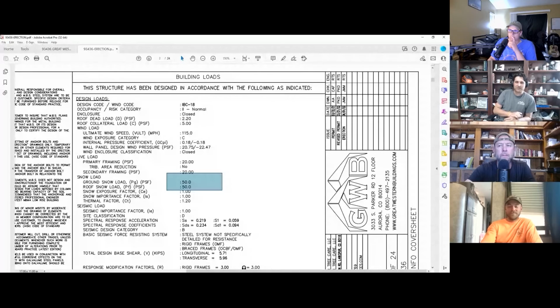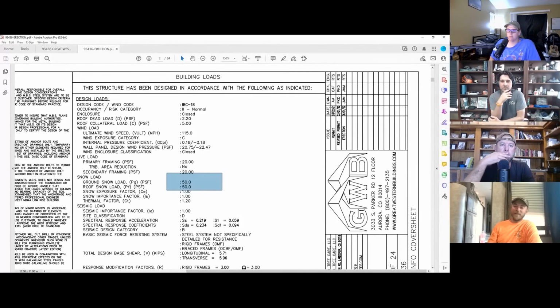And $10 a square foot or $12 a square foot, something like that for the erection. And then we had the foundation concrete. Actually, even less. I mean, $22,000, it's a 2,400 square foot building with a higher insulation system and a partition wall. Right. Okay. And then gutters and downspouts. And those overhangs. And an overhang, yeah. Above the front leaking part of the roof. Yeah, and we came back for that immediately and repaired that.